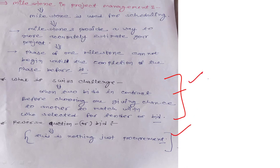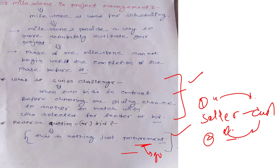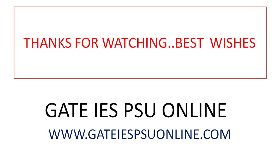In a forward bid, the seller makes the price and the customer buys. In a reverse bid, the customer makes the price and the seller competes. In government procurement, the government creates a procurement process, contractors come and offer prices — that is reverse auction or reverse bid, also called e-auction or e-procurement. This concludes the module and the subject Basics of Project Management. From tomorrow, I will start the next subject: Standards and Quality Practices in Production. Thank you for watching.